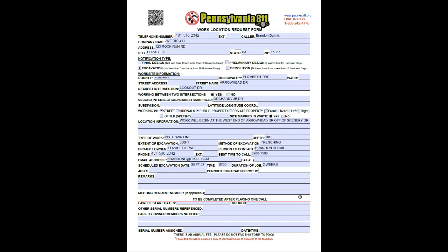Okay, so I'm going to stop you there again, Kevin. I'm going to jump in here, and we're going to do the last couple sections here. Who should we put for the contact information? Erica mentioned on-site contact. Who should we put there? The on-site contact is typically the correct person. You want the person who's on site, who's digging, who's dealing with the project, the one who knows the most information. Someone from the office might not know much about the job, but they put the notification in. That doesn't mean that if you have questions, they're the person you want to talk to. The best thing you can do is talk to someone who will be on site, who knows the project inside and out. And that's why we want the on-site contact. And we want to know when's the best time to call them for any questions that we might have.